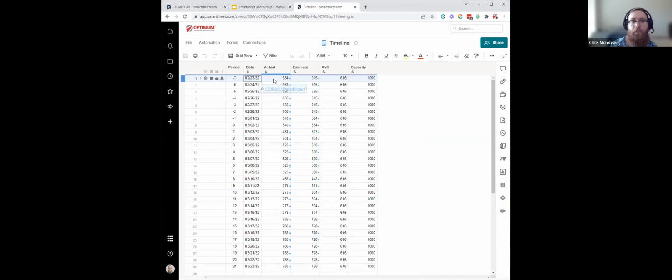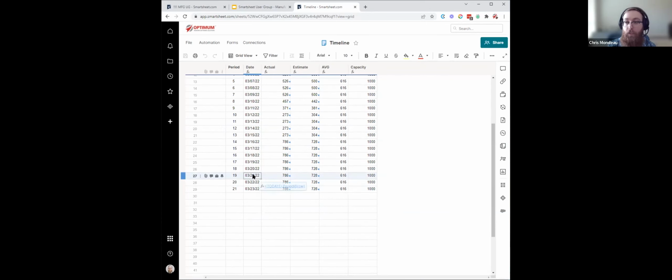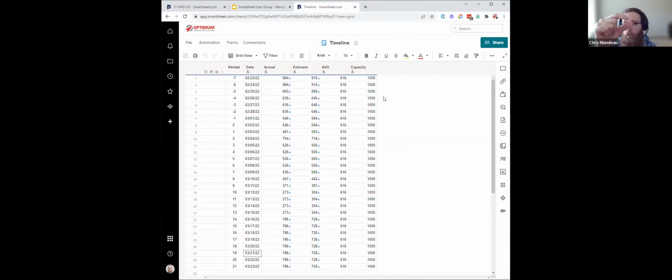Then this is the sheet that's actually being reported on that production dashboard. That's giving us that burn down over time. The more batches that are occurring during an active date, the more it sums up and increases. You can also invert this, so it could be a burn up. If you're on the construction side of things and want to see how your hours are accumulating over time, you could add in the same element, and it would show you the total hours increasing over time.